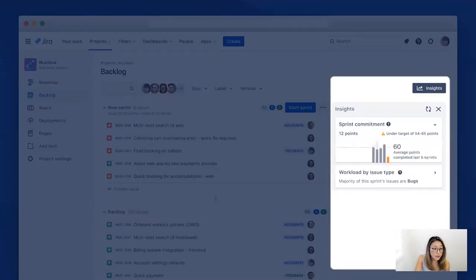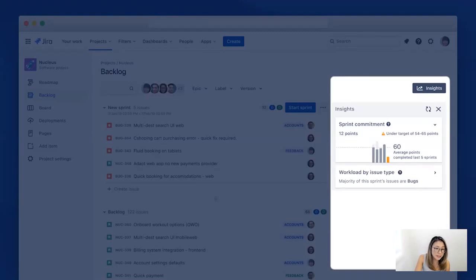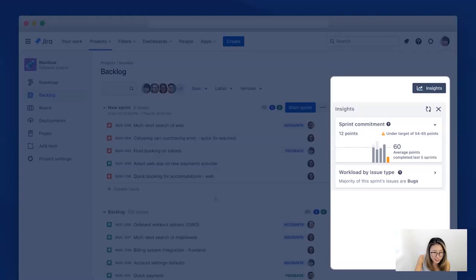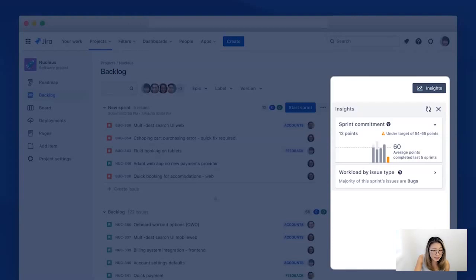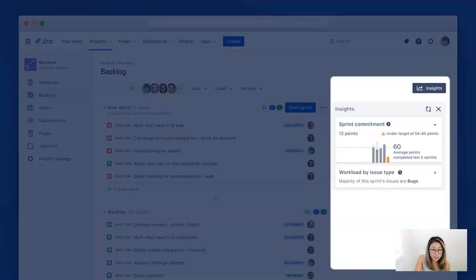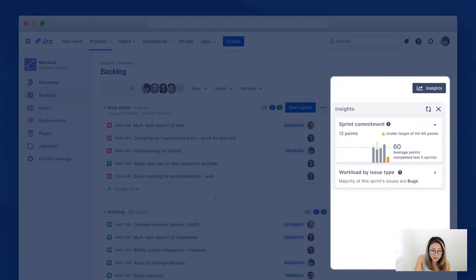So when you click the sprint commitment card, it opens up displaying a chart showing your team sprint completion trend in the past four sprints. And up close, you can see that the chart is actually displaying both the amount committed and also the amount completed in dark gray. And the target range listed here is actually the average amount your team was able to complete in the past sprints. So it's easy for you to just compare it to how much you want to assign to this sprint. Looking at it here, you have total committed amount is much less than the recommended target, which makes sense. You haven't added much to the sprint yet. So let's go ahead and add more issues.